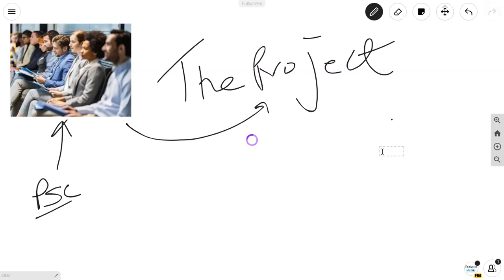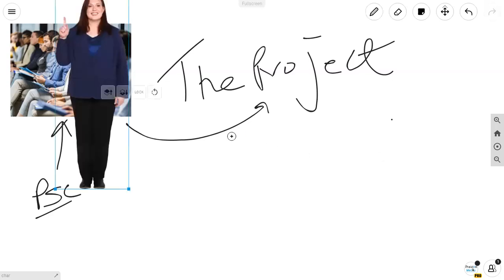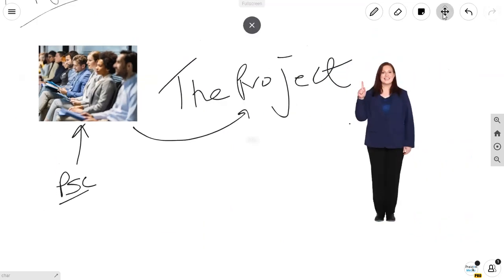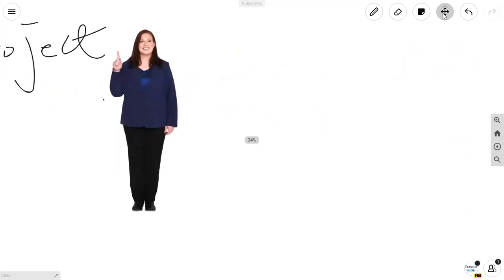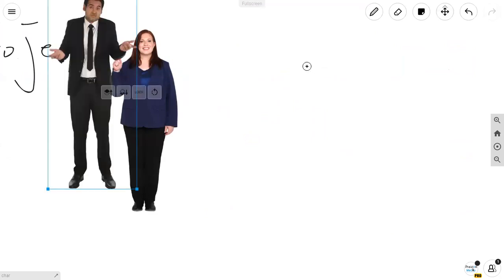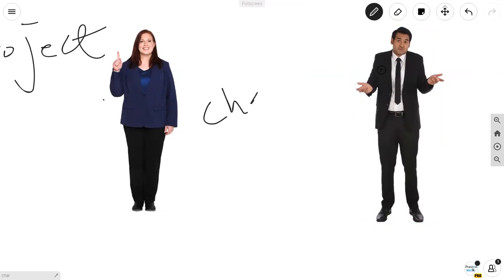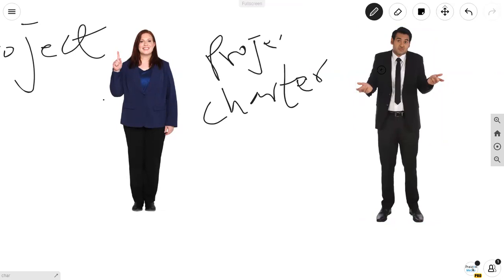The project charter needs to be created. The charter is a document that authorizes the project. The charter is created by someone known as the project sponsor, and many times with the help of the project manager. Our project sponsor is Tanya, and our project manager is Pradeep. The project charter is going to authorize Pradeep to apply resources to the project.